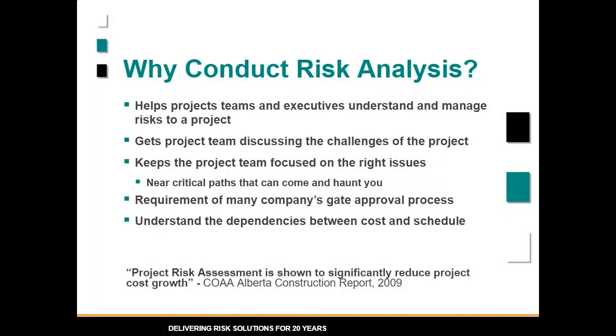So why do we conduct risk analysis? Well, there's a number of reasons. The first one is it helps project teams and executives understand and manage the risks on our project. It gets the project team discussing the challenges that are associated with the project, and it keeps the project team focused on the right issues. And when we're talking about schedule risk analysis, we're really talking about the near critical paths that may come back and haunt us. It's a requirement of many companies' gate approval process. And one of the key things that we need to understand when we're looking at cost and schedule risk analysis is to understand the dependencies between cost and schedule risk.